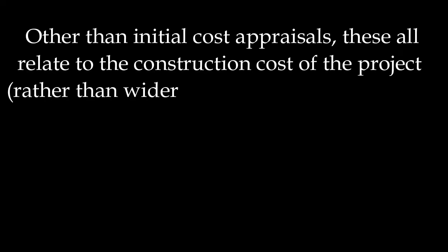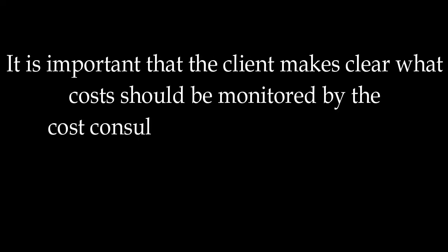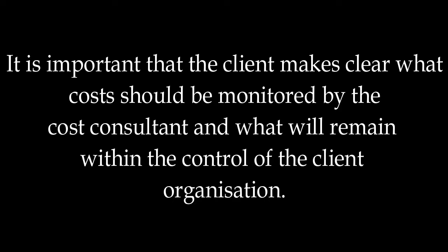Other than initial cost appraisals, these all relate to the construction cost of the project, rather than wider project costs that the client might incur, which could include fees, equipment costs, furniture, the cost of moving staff, contracts outside of the main works, and so on. It is important that the client makes clear what costs should be monitored by the cost consultant and what will remain within the control of the client organization.